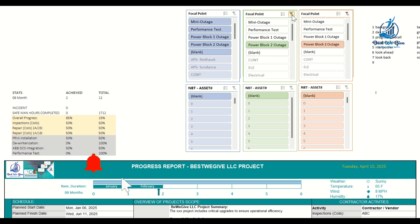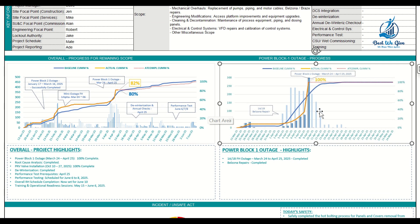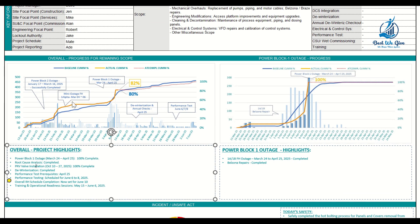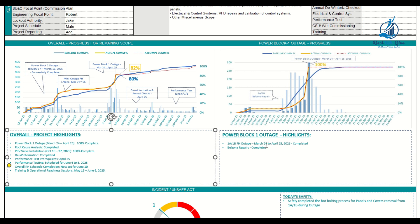To see the overall picture, remove the filters and the overall curve appears. You can then add narrative to the overall project — for example, Power Block One is 100% done, PRV installation is 100% done, and note what other activities are happening along with their end dates. For the critical path S-curve on the right-hand side, you can add details such as 'critical path job is almost done and repairs are completed.'